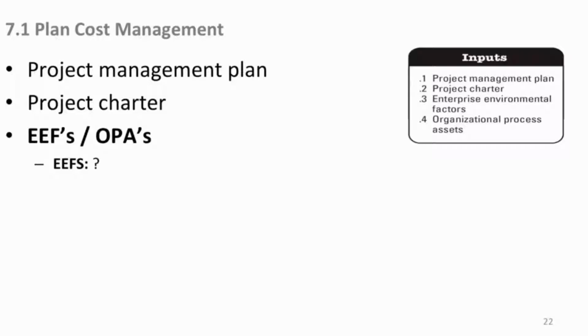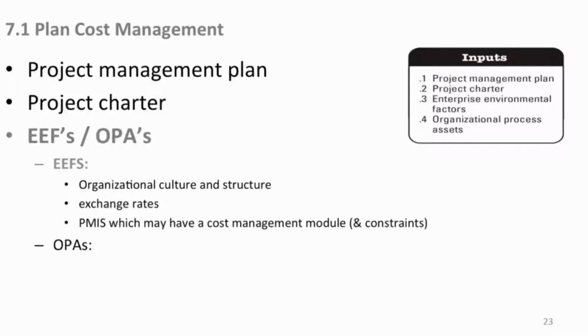Your organizational assets and enterprise factors, what are the enterprise factors? Again, culture, or structure of your organization. How is it structured? What's your power structure, your culture? Are you a very chintzy organization? Are you flush with money? Whatever that is, that's part of the culture, and that will have a big bearing on how your funding gets achieved for your project. If you're doing foreign projects or geolocated project management, you're going to need to deal with exchange rates, because those things vary up and down all the time, and that's a factor you need to consider.